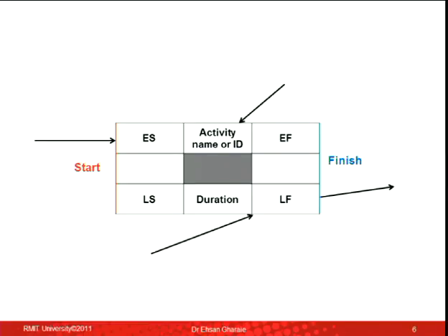Can you figure out what sort of relationship this is? Does this arrow at the top tell you if it's a relationship of finish or start? Yes or no? No. So having an arrow to the top or the bottom of the box doesn't have a meaning. You can't look at this arrow and figure out whether the relationship is between finishes or starts, or finish to start, or whatever.